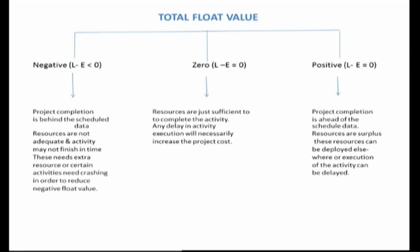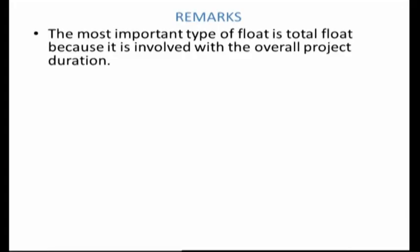With a positive float, resources are surplus and can be deployed elsewhere, or execution of the activity can be delayed. We are running ahead of time, and if any certain activity suffers a delay, we have that extra time as surplus. The most important type of float is total float because it is involved with the overall project duration. The change in the value of total float changes the interpretation of the entire project duration.